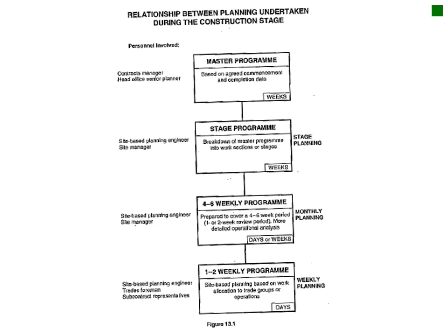Please just note that the people involved in this process are usually the contract manager, the master program, and the site-based planning engineers. It's basically a very straightforward thing of your master program being scaled down into different levels, where you have your stage program, then your weekly program, and then your 1 to 2 weekly program.